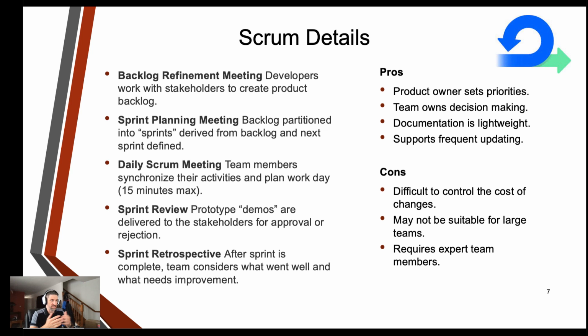So there's going to be some of these, but they're not going to follow the exact model of after every sprint in our class project. And finally, there's a sprint retrospective where the team considers everything that was done during the sprint, discuss what went well, discuss what could be improved, and any lessons that are learned, address any bottlenecks or challenges faced during the sprint, and brainstorm ways to make things better.